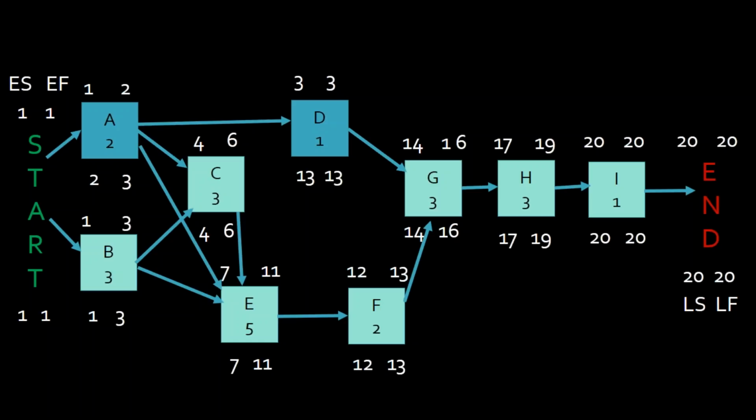So good project managers are managing to their critical path. You want to know what your critical path is. And I've got news for you: on some projects, there are multiple critical paths or multiple near critical paths. I don't want to confuse you too much. Don't worry about all that. This is what you need to know for the exam. But I'm telling you, out in the real world, that's what you do as a project manager. You manage your project with critical path in mind.